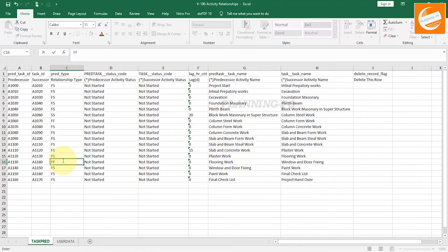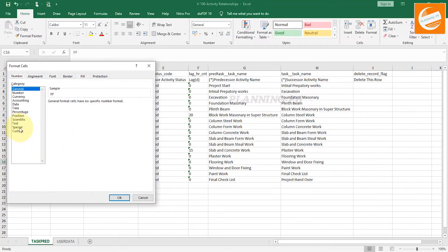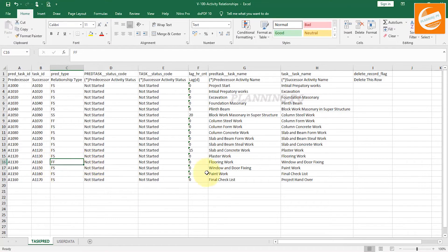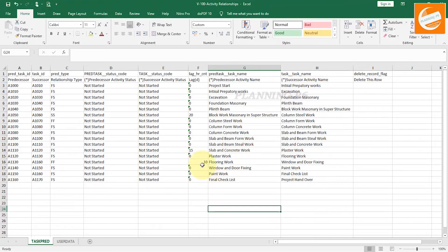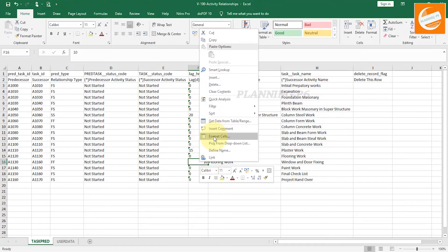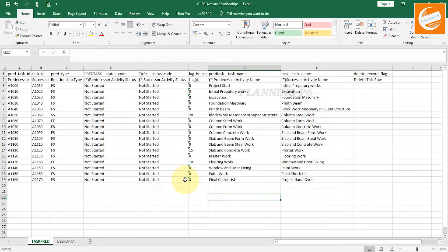Paste the values and format the cell as Text. Change the relationship type to Finish-to-Finish. You can change between Finish-to-Start, Start-to-Start, and Finish-to-Finish. Format that relationship cell as Text as well. If you want to add a lag of 10 days, add it here and format the lag cell as Text.